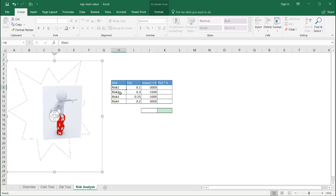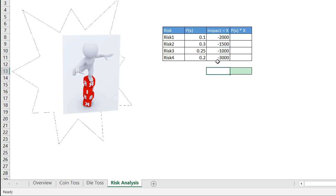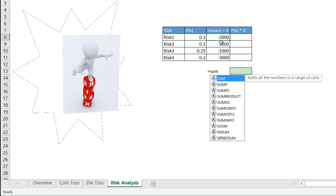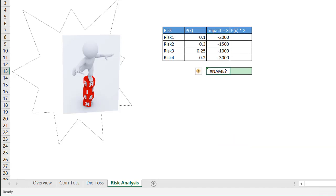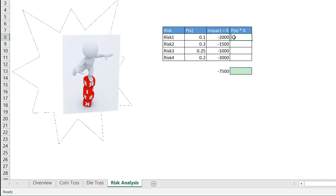And it's relevant because as a project manager, you may be thinking about risk. And you have a set of risk on your project. And you kind of know subjectively what are the probabilities of this risk happening. And you have determined a value on those risks. You may think that these risks are going to happen, and I need to have some monies in my budget to align to these risks, right? So you may think, I'm just going to sum up all of these. Let me open parentheses. I'm going to sum up all of these, close parentheses. And I need to have about $7,500 in my project, in my budget to mitigate these risks or pay for these potential risks. But that's probably not correct because there are probabilities that occur.